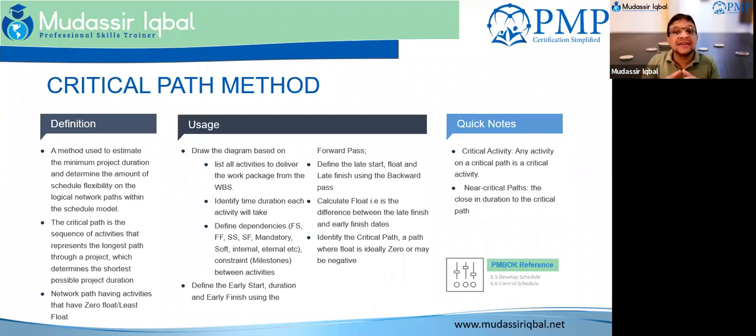Then there is another activity where you make the same comparison, and you say, no, we have to do this activity in 3 days, although the cost is higher, the risk is minimized. So you will put Tharmila on that activity.